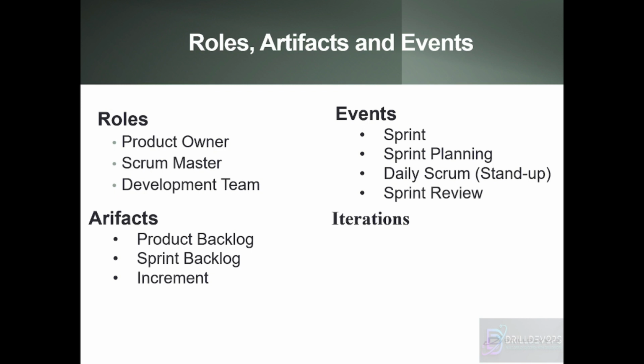that particular sprint? Let's suppose you have picked 5 tasks for the previous sprint, and during the retrospective, you could say you have successfully completed 3 tasks. One is in progress, with a dependency on another team. The other one I couldn't pick because I didn't have much time. So you can carry that backlog item to the next sprint. Okay, so that is what these discussions in the sprint planning are about.